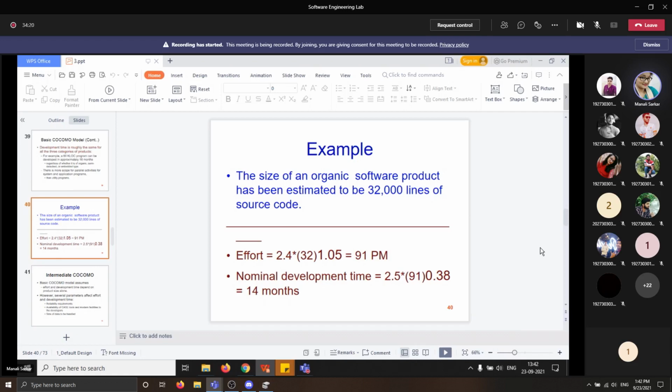Okay. So here we have seen that from the effort estimation, the project cost can be obtained by multiplying the required effort by the manpower cost per month. In this project cost computation, the assumption is that the entire project cost is incurred on account of the manpower cost alone. In addition to manpower cost, a project would incur costs due to hardware and software required for the project and the company overheads for administration of its space.